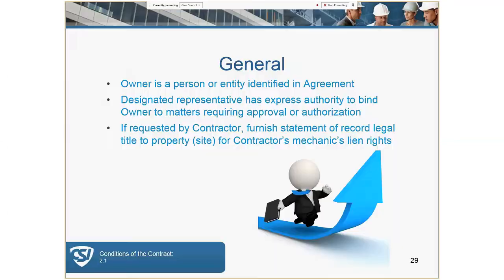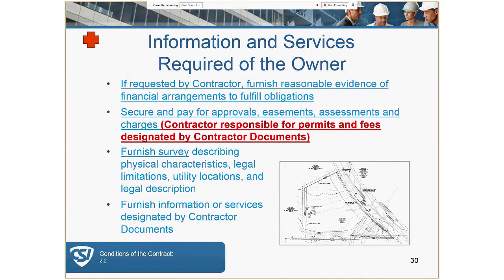The owner will be identified in the document and must designate a representative authorized to bind the owner for future modifications or directives. More likely than not, the owner is not going to be on site every day, but their representative must be able to bind the owner. The owner may be requested to provide assurance of funding, and is responsible to provide a survey. Building and site permit fees might be paid by the owner as part of the pre-bid process; utility and tap fees as well.